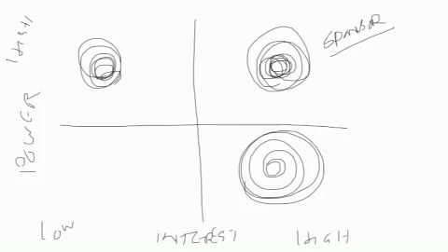And we should have strategies to deal with them. And then there could be a set of stakeholders who don't have any interest in your project, and their power to influence your project is also very less. So they can be just ignored.